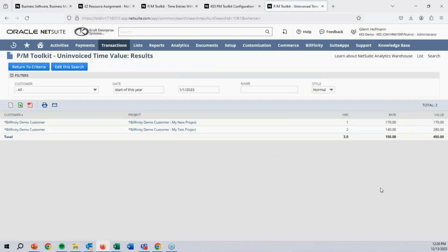It includes all your unapproved time, so that's why it's pretty useful compared to some of the built-in stuff. So I can see how we're doing for the month, how we're looking. I can see if somebody's billed a crazy amount of hours for some project that I wouldn't have expected, so I can double check that before I get to the end. I get another check on the blended rate that's being billed. So this is kind of taking the average when I take the different rates and the time to see that. So I get a nice view so I can know in real time how we're doing.